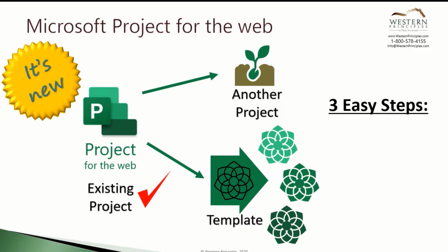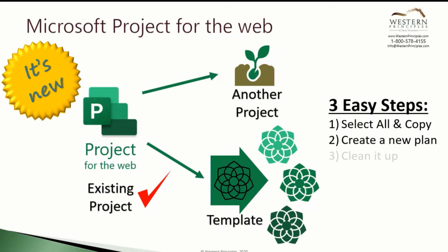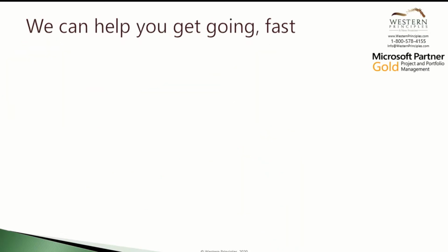We just showed you 3 easy steps to reuse your Project for the Web schedule for starting another project or creating a template. Select all the tasks in a project and copy them. Create a new plan and paste them in. Clean up the new plan for future use. Easy, right?